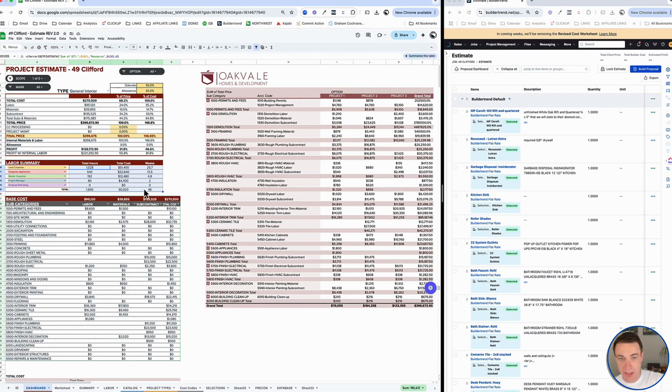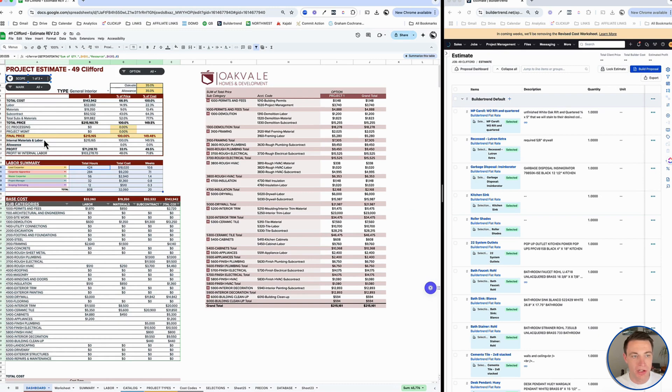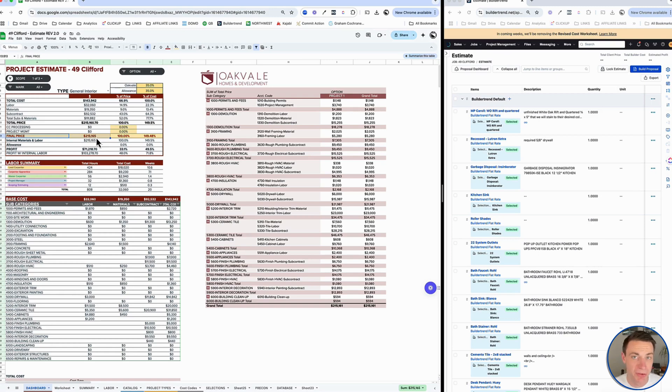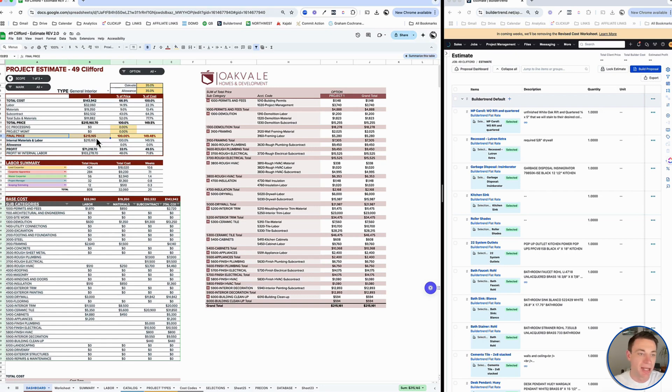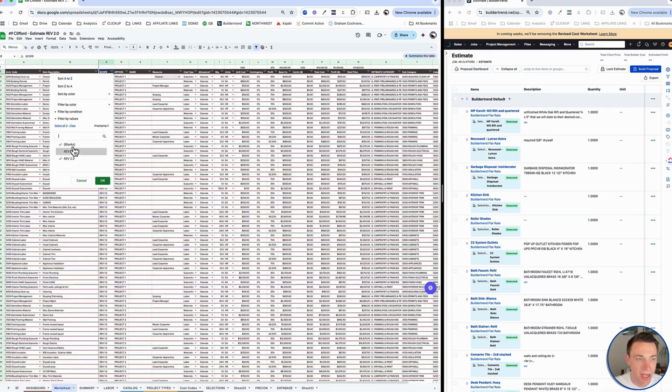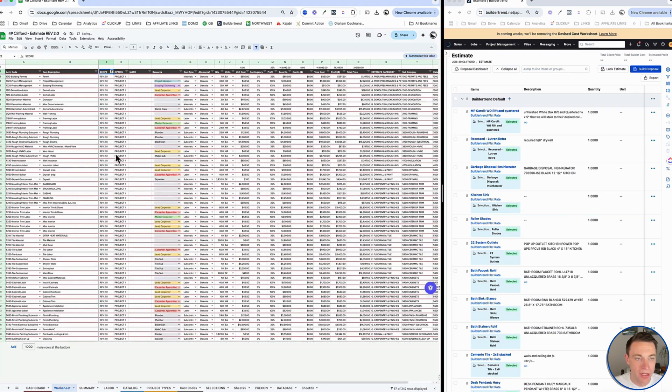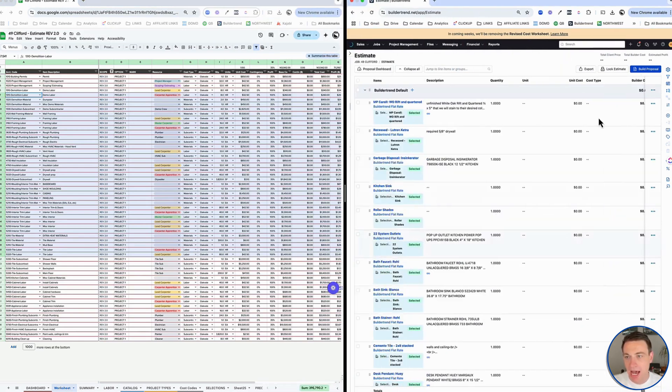Eventually, we get it into BuilderTrend. We've got our scope revised 2.0. We've gotten through pre-construction, we're all done, and we've arrived at a final price of $215,000. That doesn't mean that's the final, especially if we're doing open book. This is our final for our build contract. Now we bring it into BuilderTrend to manage the actuals, what we spend against the budget, selections, change orders, and all of that. If I look at my worksheet and filter down on revised 2.0, there's what I'm going to bring into BT or BuilderTrend.